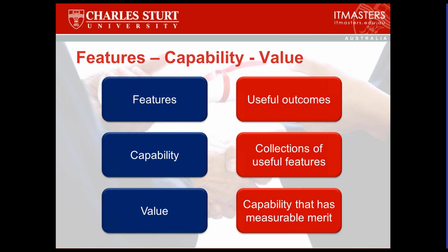And yes, they can and may well be, but you've got this enormous conflict that arises, and it must be managed very carefully, and it can be very problematic. If a person is a Scrum Master and a member of the team and a productive worker, if that's what happens because it's a small business or a small team, be very clear on what is the more important of those two roles. And in my view, Scrum Mastering always comes first, because the role of Scrum Master is the leveraging force of making sure that everyone else is delivering. And if that becomes second best, then what are we doing? We're saying, well, that person is putting their own output above their responsibility to everyone else's output. It can't happen that way.